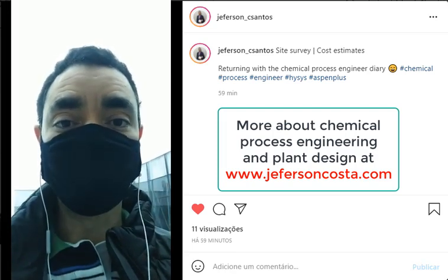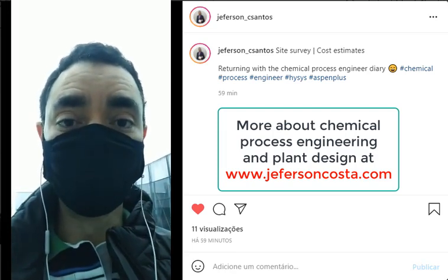We can get minus 5 to plus 2% of variation. And when we go to construction, we confirm that information in order to make sure that the project will be installed within the budget and the company will be able to guarantee its revenue, and in that way everyone will be happy.